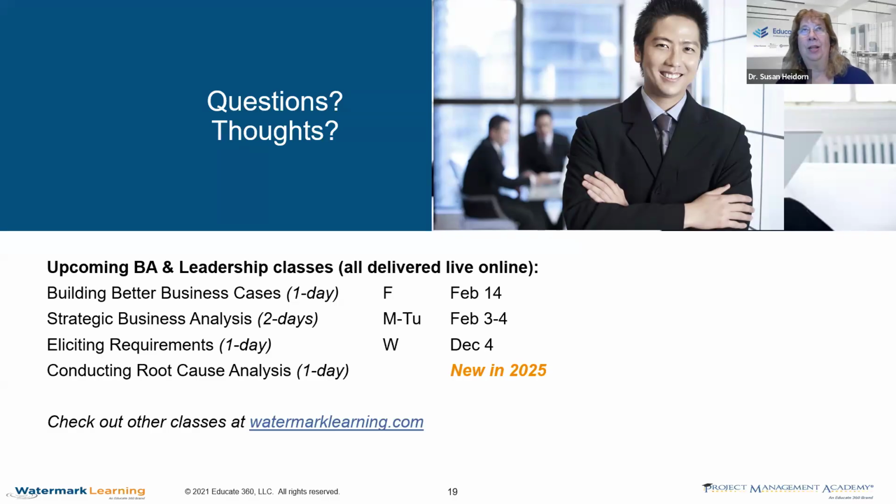Well, I would start with the project team and seeing who on the project team can help stakeholders with that, and then encourage them, create an atmosphere, create an environment in which the people that are impacted are involved. Often if you get them involved in org change management, the people side of change, then you get their buy-in, and they will help you get the buy-in of others. You find those key people who are interested in either org change management or having a part to play in the new situation.